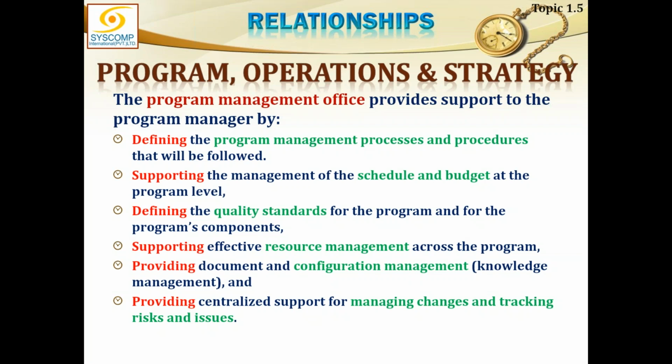Number one, defining the program management processes and procedures, supporting the management of schedule and budget, defining the quality standards for the program, or for that matter, for the program components, supporting effective resource management across the program. This is kind of the job which portfolio management was doing for the projects and programs, but you are doing it within your program for the components of the program.